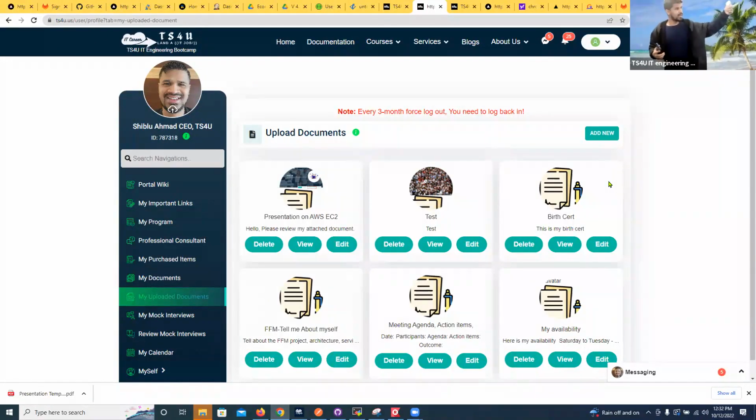So when the software engineer has done something, you become part of that meeting. What meeting? The technical review meeting. The software engineer sets up a technical review meeting with the senior engineer, with the QA. Why? Now they're explaining your user story. Hey, this is what has been done. This is how it works. That's how the QA knows what to do, how to test it out. You jump in and join that call. So at least you're listening, because everybody is working based on their user story. That's how you will be engaging throughout the sprint.